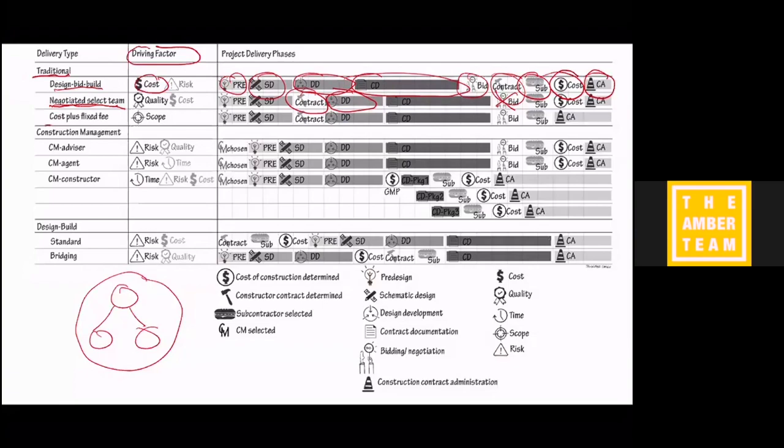And then for cost plus fixed fee, the contractor is going to be paid something, and again, the contract is going to come a bit earlier. The contractor is going to be paid something to cover their costs, and then also they're going to be paid by the owner a fee that's going to make up the majority of the profit for the contractor. And what that accounts for is, well, let's say that we were building a cruise ship repair facility.